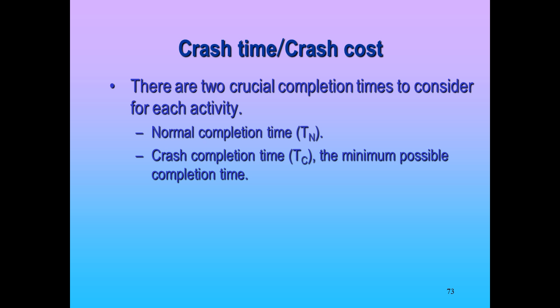So before there was fancy software, this is the analysis that people did. They say, what's the marginal cost for reduction? What's the cost per reduction? And then they started with the critical path activities. That's where they started applying the money, or the resources, the people. Okay? Now I'm going to show you the templates, but we're not going to use them. Now the software can do this. It can say, hey, here's the best way to apply your extra money.